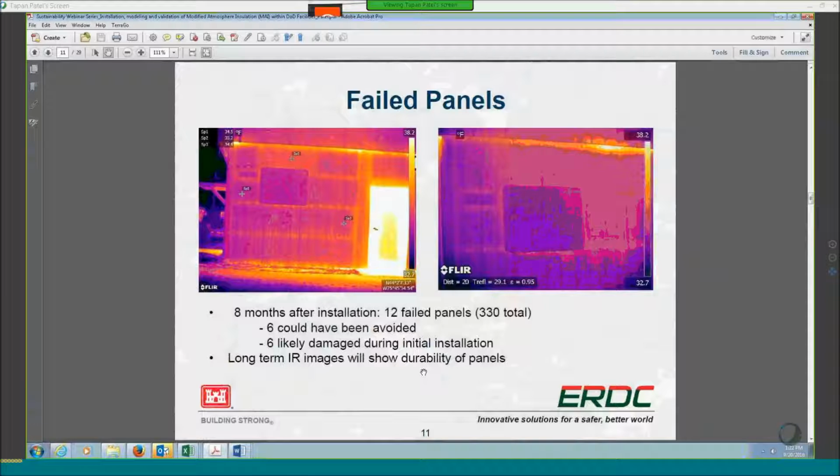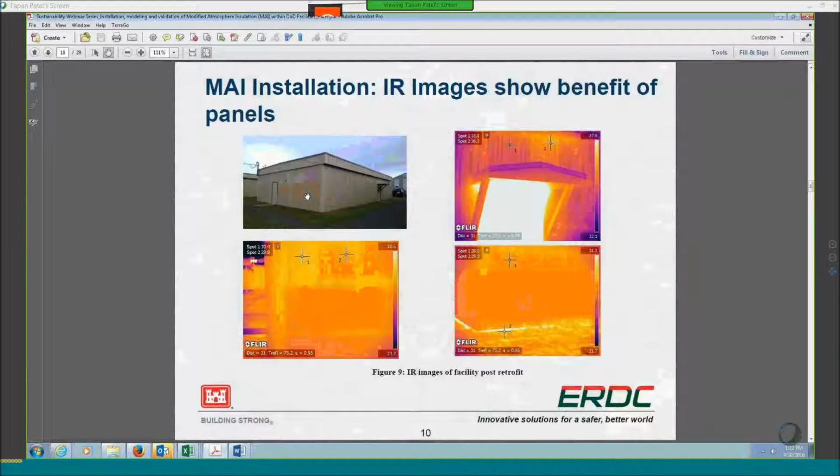One other item we didn't account for, and this is another lesson learned, is coordinating with the facilities and the owners of the facilities. Before we had completed our work, we'd sealed everything up. After we left site, some DPW staff had come in and put these new signs on. And so, as you can see, just looking at the building, you can't tell that there's anything different.